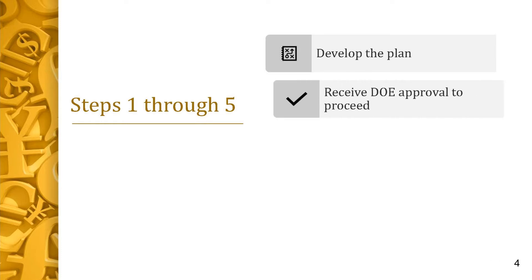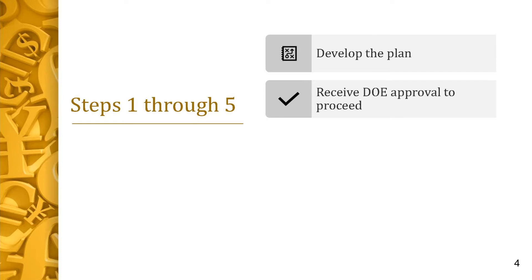In Step 2, the contractor submits the formal request for approval to initiate the OTB to the DOE contracting officer. The request includes a top-level projection of potential cost and/or schedule growth, a recommendation of whether performance variances will be retained, and an implementation schedule. Upon approval from the contracting officer, the contractor and DOE will proceed to Step 3.